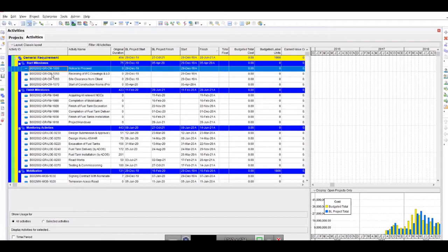In case you cannot do this, we will see how we can modify things in our existing model, for existing projects where you cannot change activity IDs. For example, you have given the project to multiple places, to project engineers, to all other people who know the activity IDs and are updating them. You don't want to change this, otherwise you may need to change at many places, so you want to avoid that. In that case, we will see how we can make the activity ID unique. This is the one case. Or in the future, my recommendation is to add the project code, so that your activity IDs are unique at portfolio level.